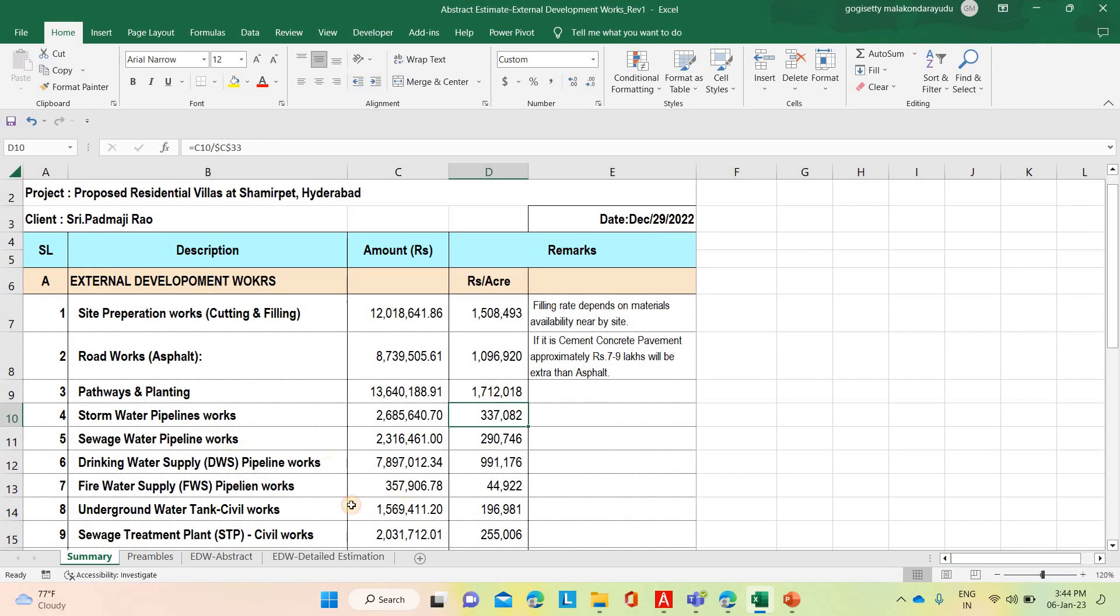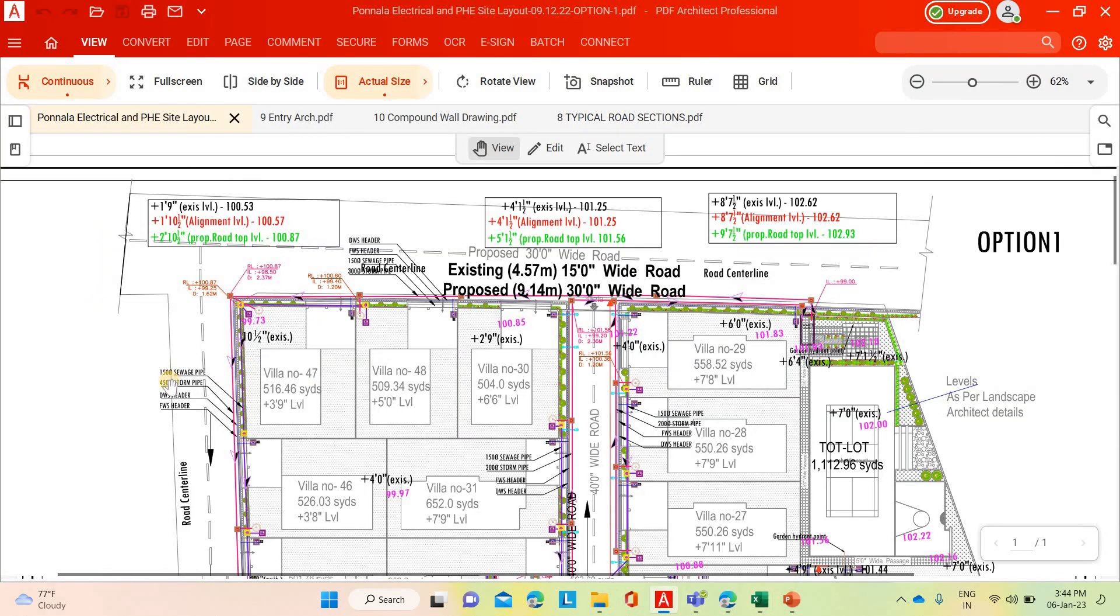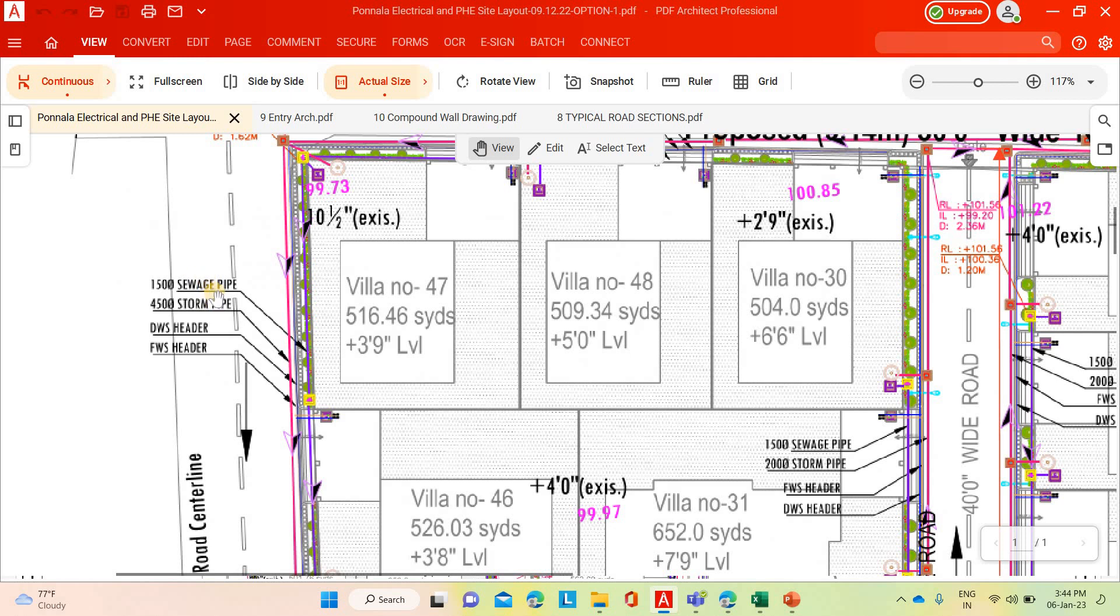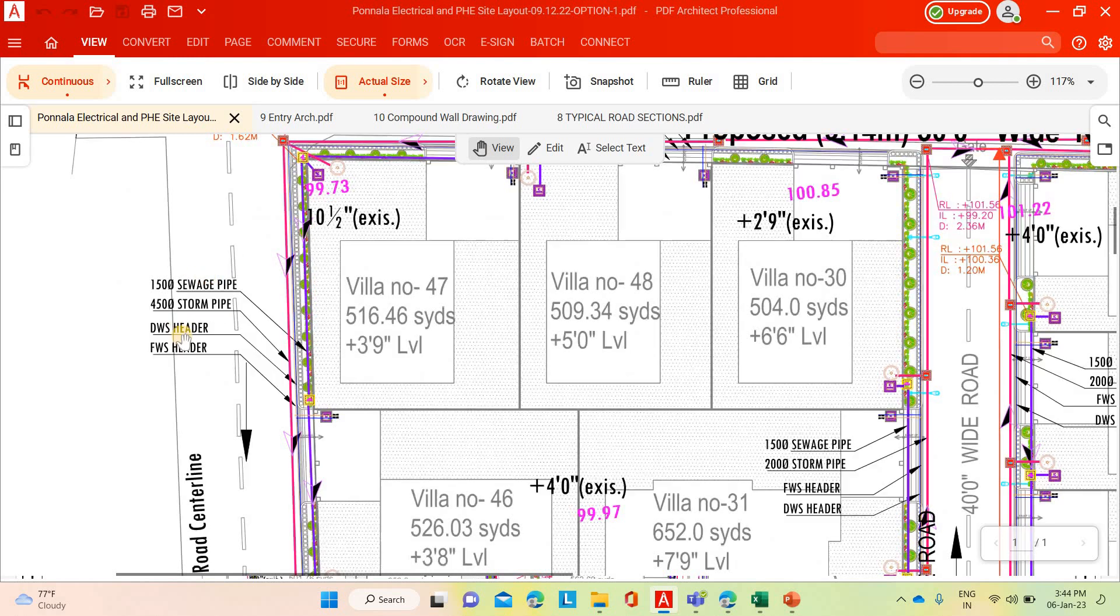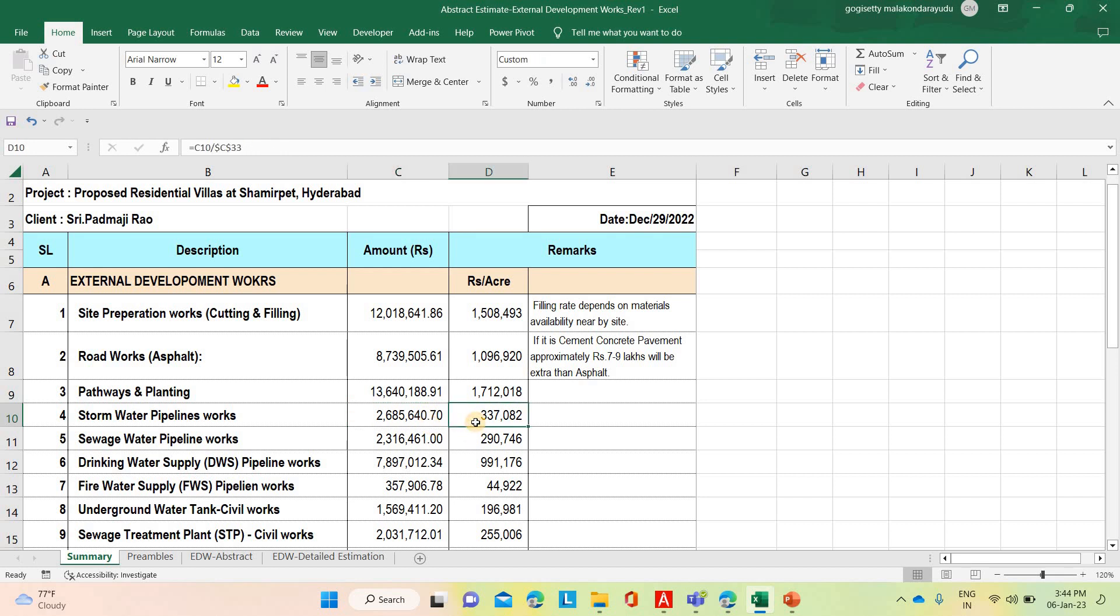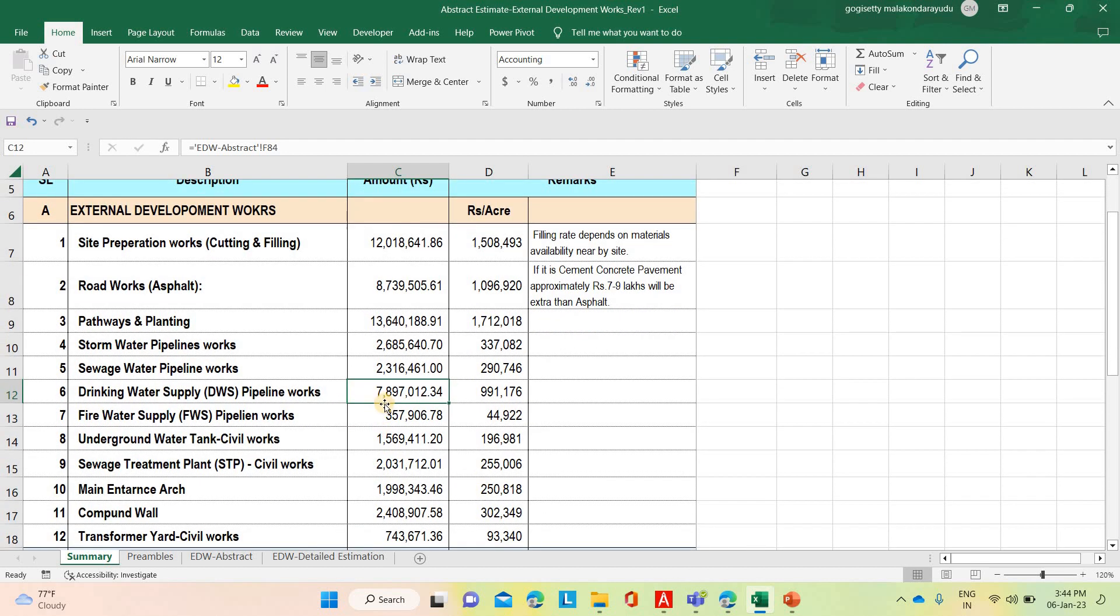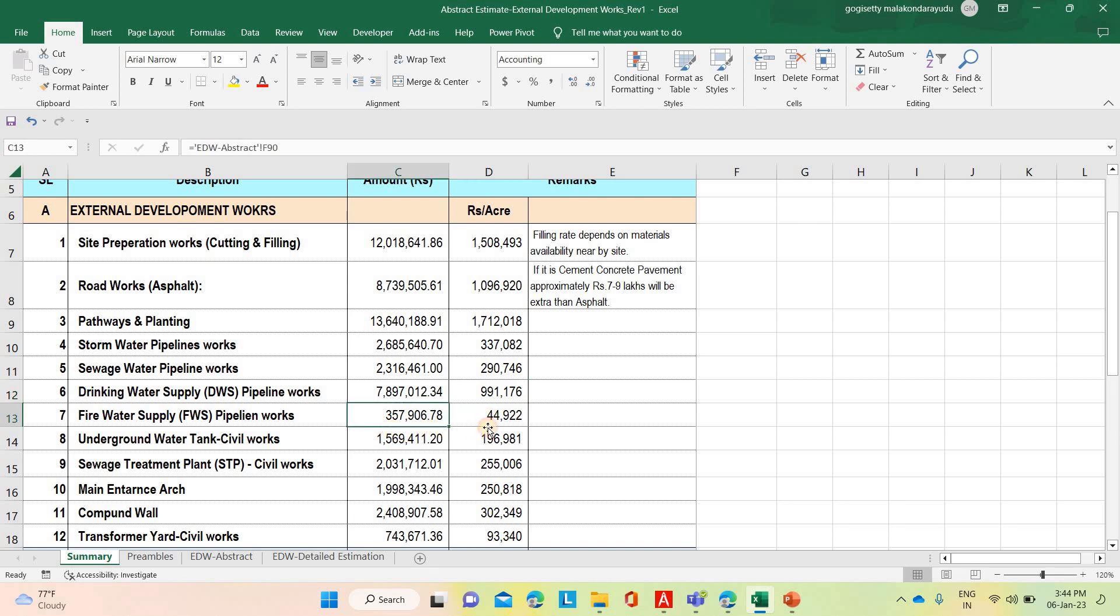Then stormwater line. As I told earlier, different lines - stormwater line, sewage line, drinking water supply, fire water supply. All those works are coming based on this estimation. Stormwater line, 26 lakh 85,640, that means per acre 3 lakh 33,000. Sewage line, 23 lakh 16,461, per acre 2 lakh 90,746. Then drinking water supply, including the valve chambers and everything, 78 lakh 97,12,000, and per acre 9 lakh 91,176. Fire water supply, 3 lakh 57,906, that means per acre 44,922.